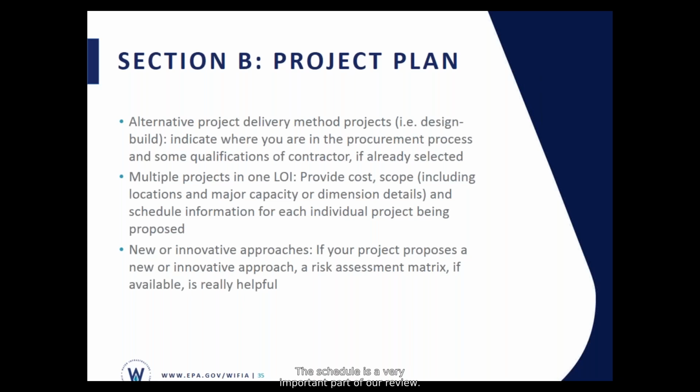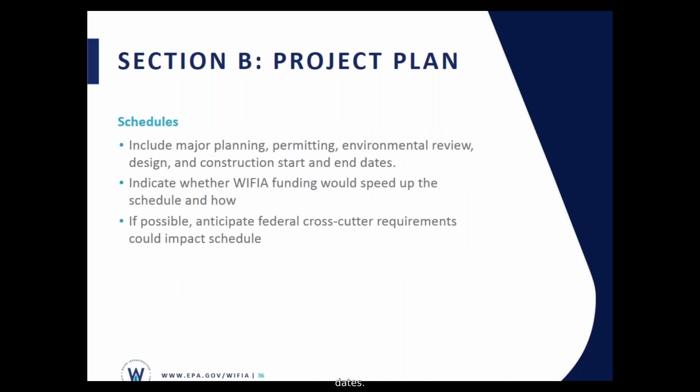The schedule is a very important part of our review. Please include major planning, permitting, environmental review, design, and construction start and end dates. One of the other things we try to assess is whether WIFIA funding would speed up your schedule. So if WIFIA funding would allow you to move up any of your scheduled dates, please let us know. We look to see